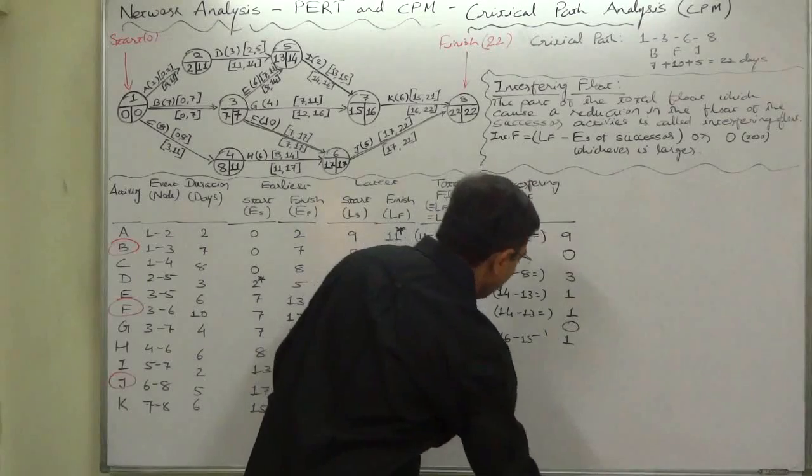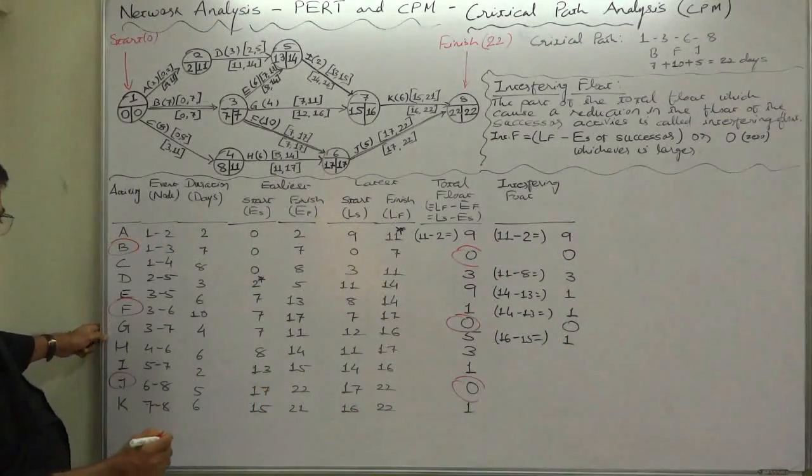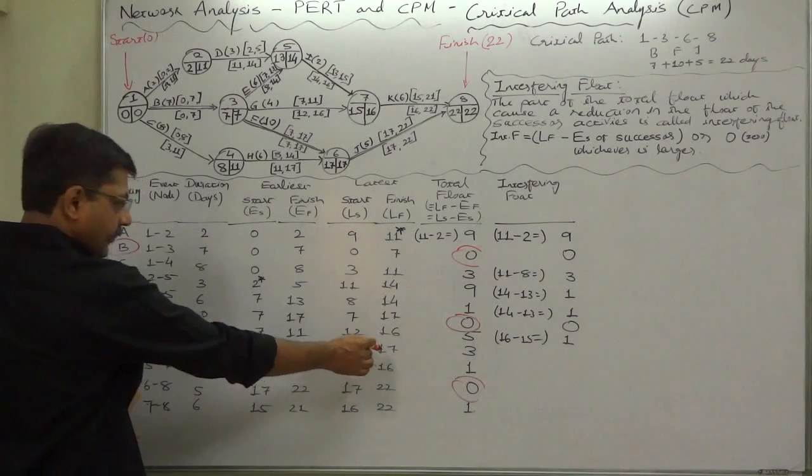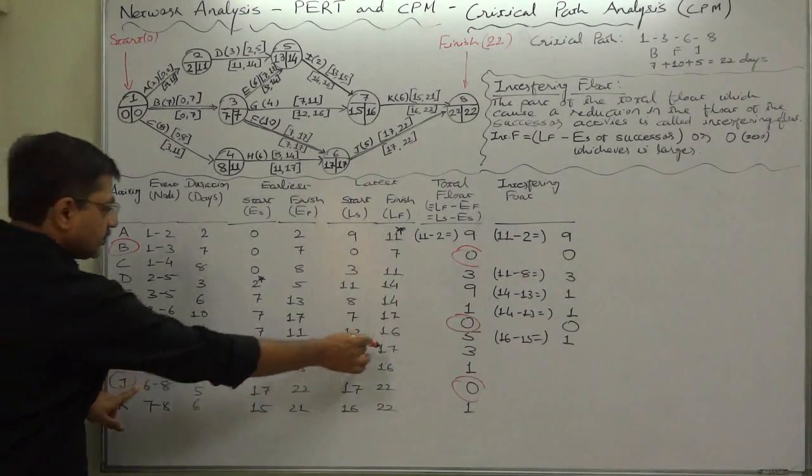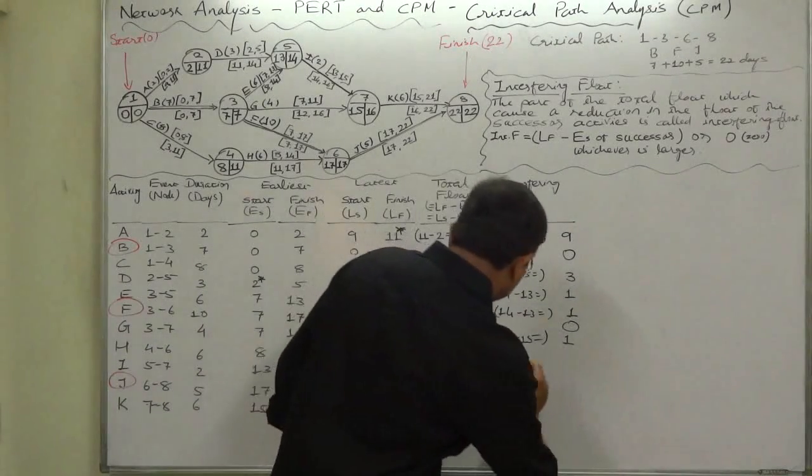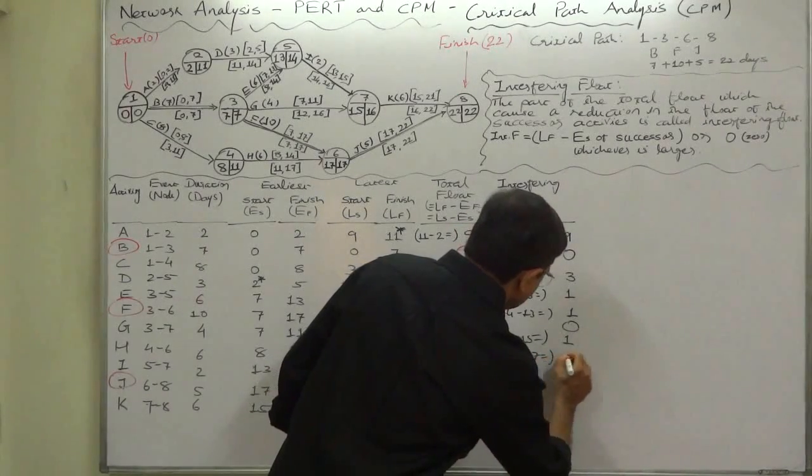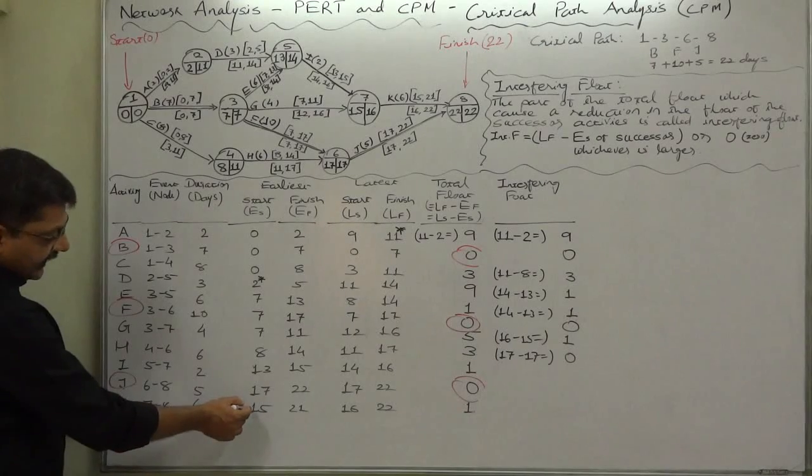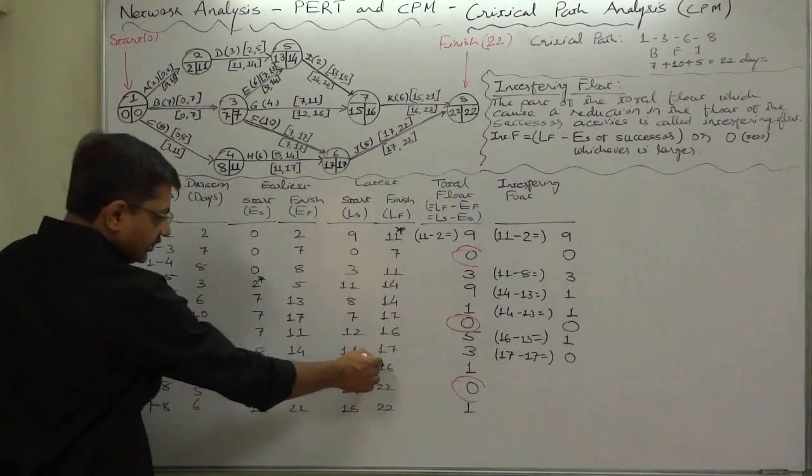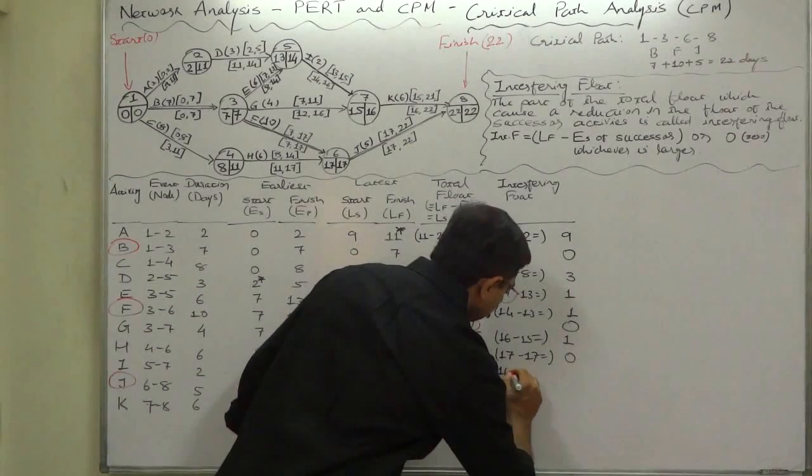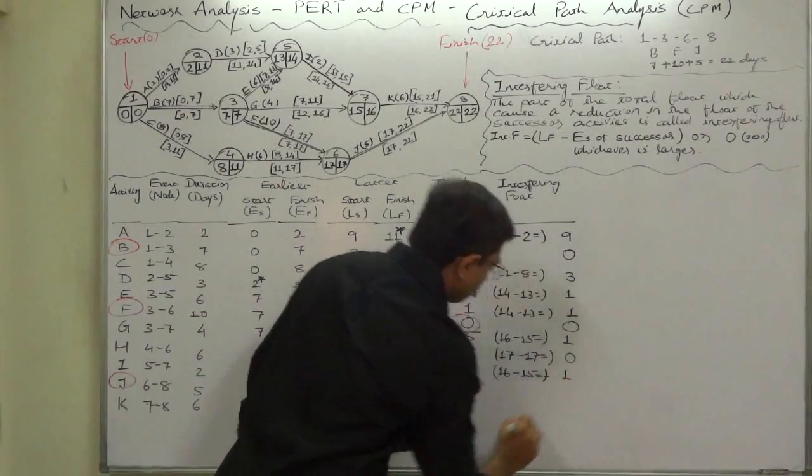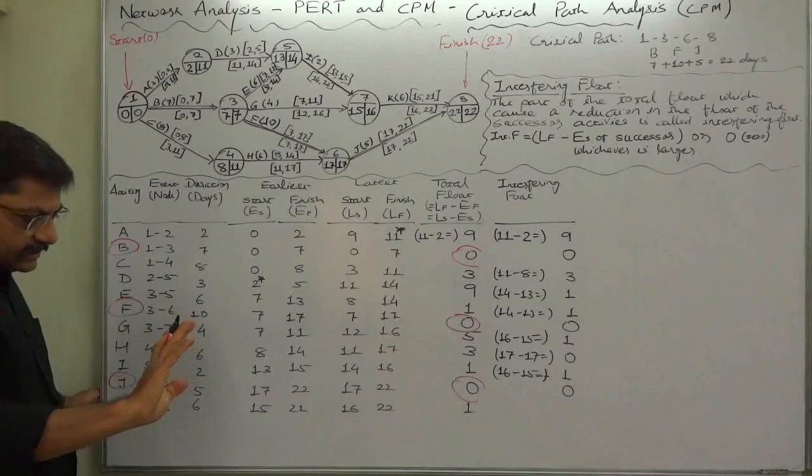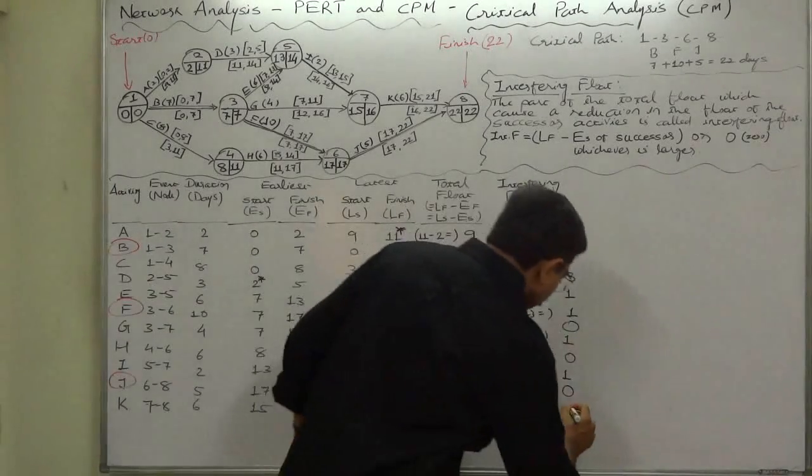Then H: latest finish time is 17, successor of H is J, earliest start time is 17, so 17 minus 17 equals 0. I: latest finish time is 16, successor is K, K's earliest start time is 15, so 16 minus 15 equals 1. J: critical activity, so 0. And K: there is no further successor activities, so it will be 0.